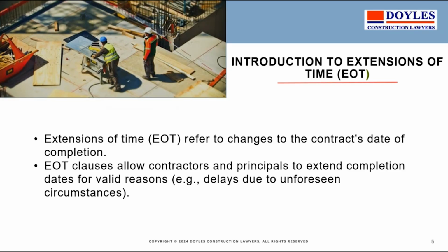The EOT clauses allow contractors in principle to extend completion dates for valid reasons. Those valid reasons are found in the contract. The important aspect to note, as a baseline for this legal analysis that we're introducing, is that the law would say if you've agreed to complete a contract by a certain date, then you've got to complete it by that date. And there isn't too much leeway in that situation.